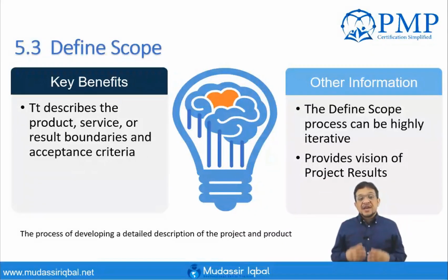Defined scope is a very important process because at the end of this process, you would have what you are actually going to deliver. The requirement documentation that we have done as part of the RTM and other requirement documentation, which could be flip charts, minutes of meetings, or emails, will be developed into the project scope statement. It defines deliverables with acceptance criteria more clearly than the objectives stated in the initiation phase. This document defines scope. The project scope statement covers both project and product scope.